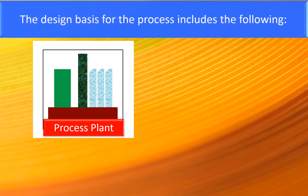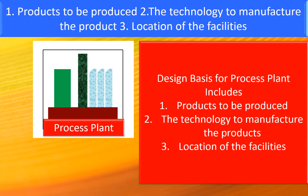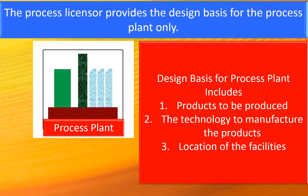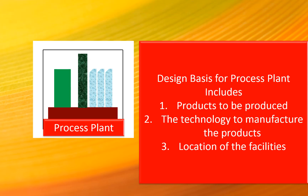The design basis for the process plant includes the following: one, the products to be produced; two, the technology to manufacture the product; three, the location of the facilities. The process licensor provides the design basis for the process plant only. For the support facilities, the design basis is developed and provided by the detailed engineering consultant.